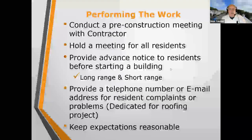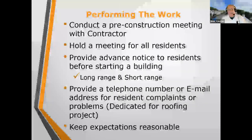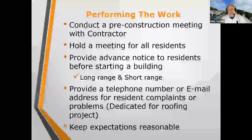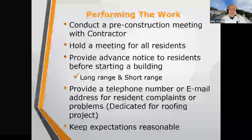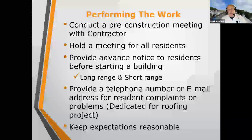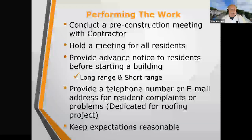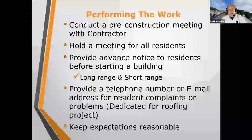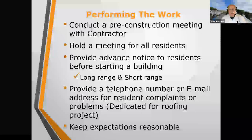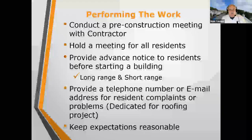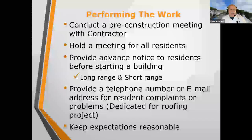When performing the work, after selecting a contractor and executing a contract, the first thing you want to do is conduct a pre-construction meeting on site with all parties — the contractor, the engineer if doing oversight, board members, and the management company. Walk the site and look at the logistics: where dumpsters will go, how much parking will be taken up, where you'll start staging materials. You'll also be looking at vegetation and trees that need to be trimmed to get ready for the roofing project.